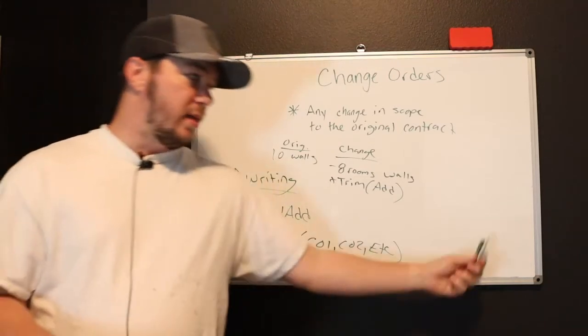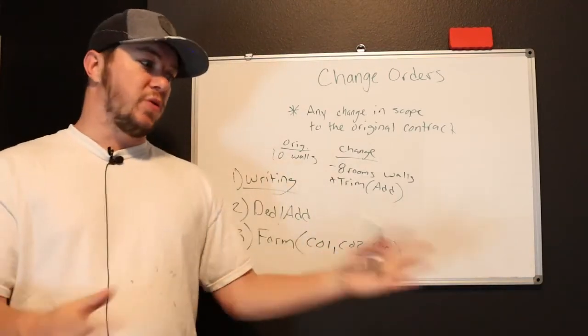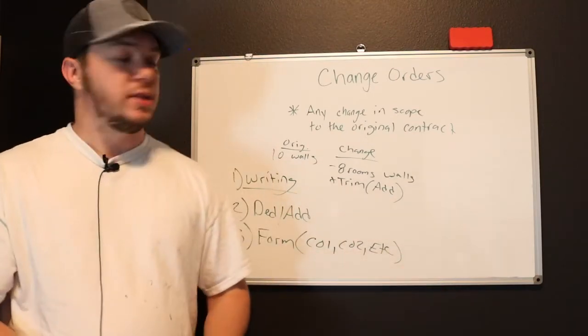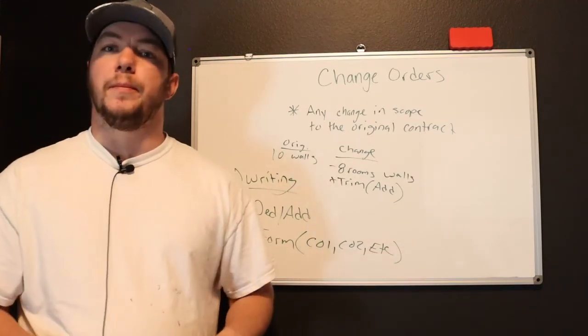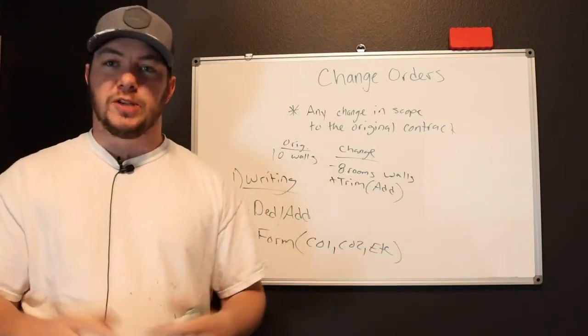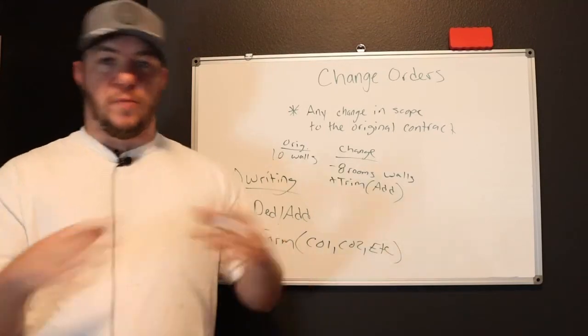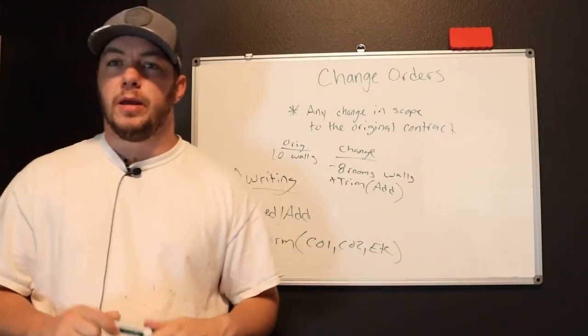Because maybe you had this construction schedule that was for three weeks and this extra work or this change order is going to extend you to four or five, six weeks. And you've got other jobs lined up behind that. You need to make your money for inconveniencing your schedule, especially if they need you now, especially if you've got to reschedule other jobs, you got liquidated damages on other jobs and you've got to move people or move crews around. You need to add a premium in.